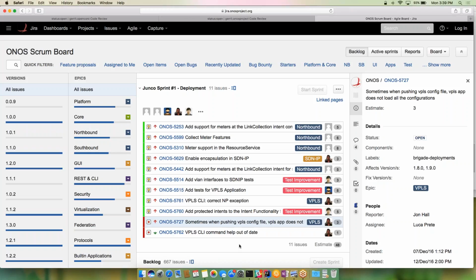So I think we could time box the implementation and review of the solution that we have, which would probably be 2 or 3 points. And then if we realize that doesn't actually solve the problem, then we pick it up again next sprint. Okay. And it's something that Pierre and I have worked together on, and so it probably is going to need a little bit of both of our attention. I don't know if it's 2 points each or 3 in 1 or something, but